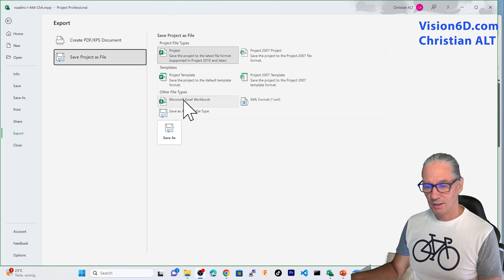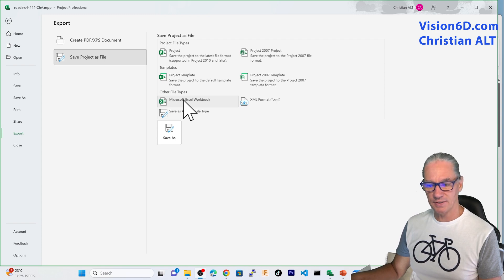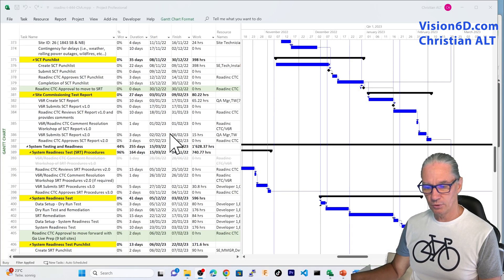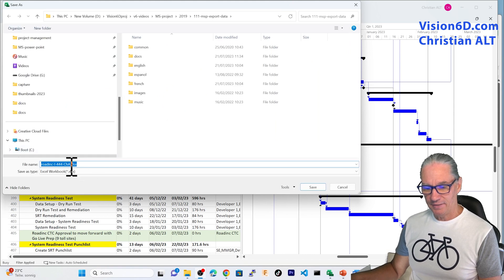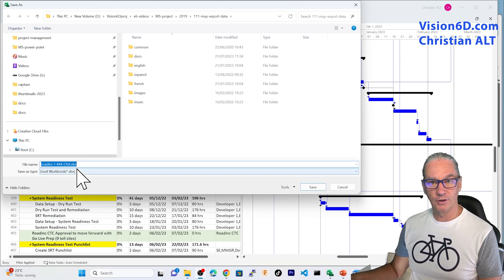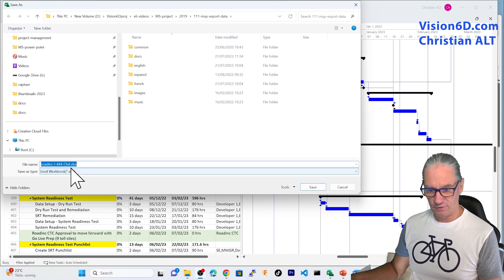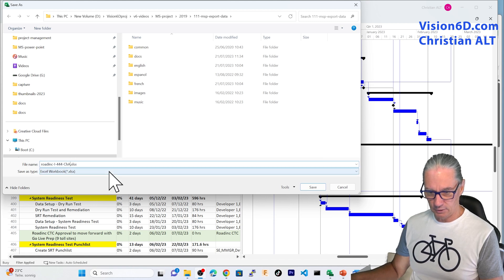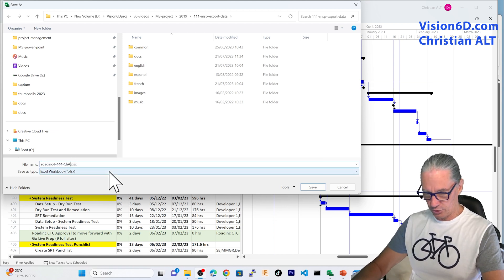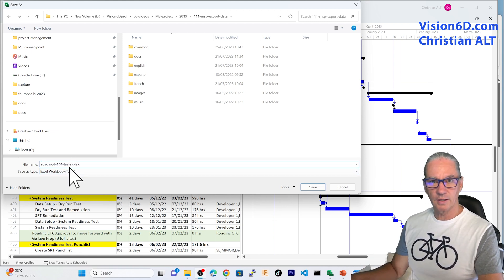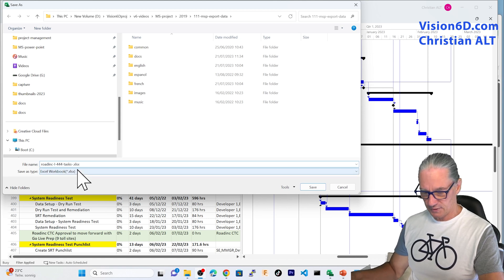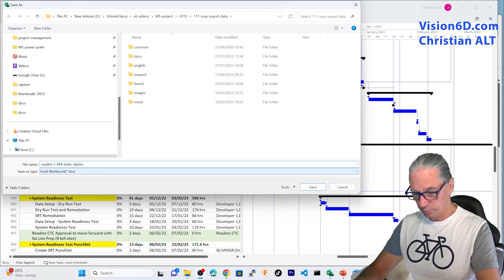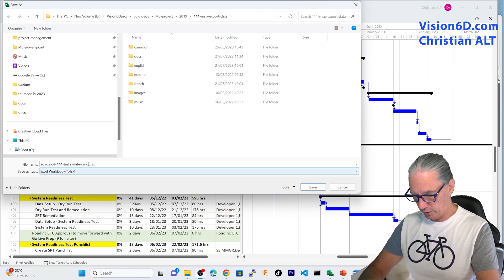In my case, I'm interested in saving this as an Excel file. So, I go into Save As and then, it's going to ask me the name of the Excel file. I'm leaving the project name. I'm saying that I'm exporting the tasks and they will be in a certain date range.